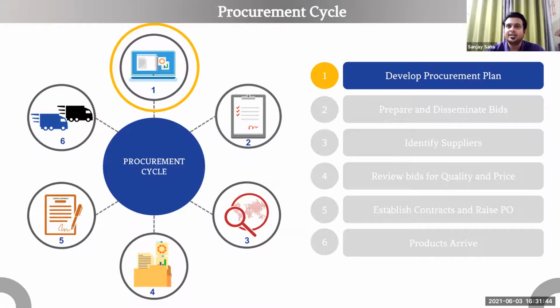The reason why we are talking about planning and giving a lot of emphasis on planning is because procurement is a very long process, and more so when it is conducted annually. I was reading some responses in the discussions, and there was a question about procurement lead times, and the lead times sometimes are very long, like 6 months, 12 months.